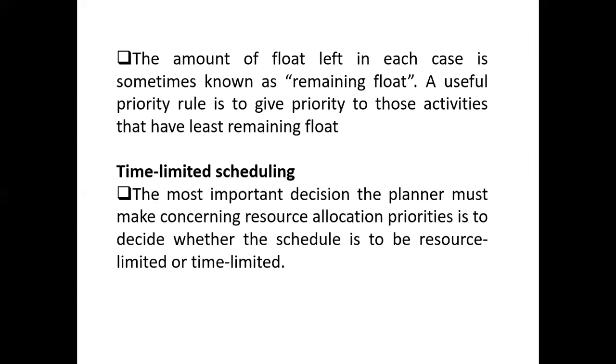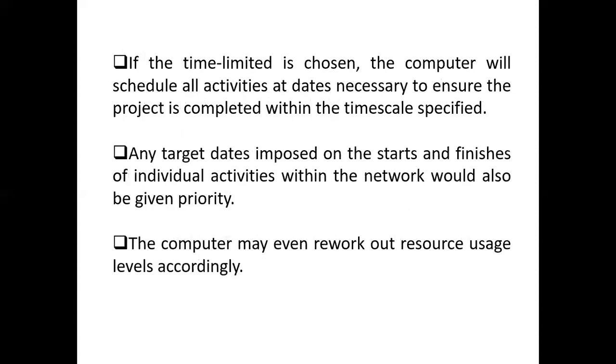It is either done within a specified time frame or it won't be done at all. Such activities we need to focus on, giving them the resources they need, because after that they will be useless. If time limited is chosen, the computer will schedule activities on the dates necessary to ensure the project is complete within the time scale specified.